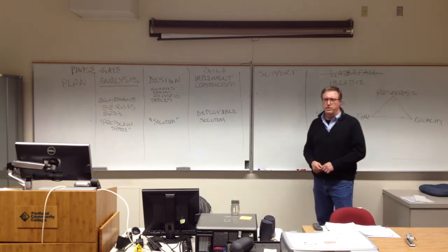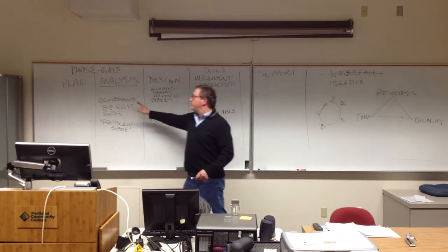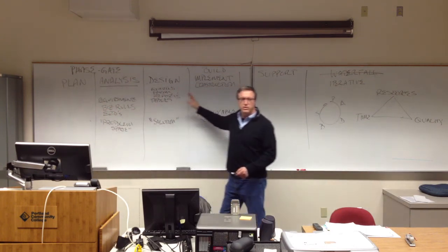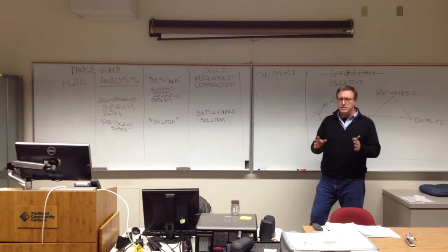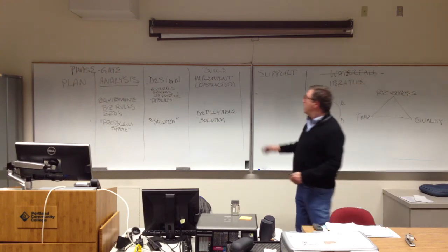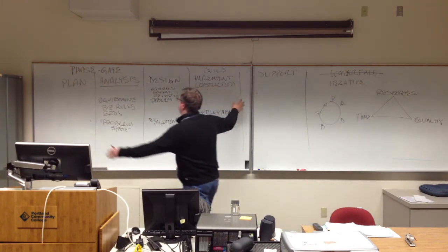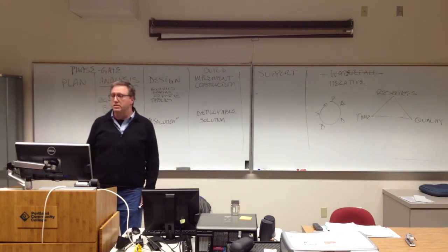I tended to work on fairly small things, so there were 7 to 20 people on it. If the projects where they expected to do this for 6 months, and then do this for 6 months, and then do this, they'll fail. So these days, people do this in what's called an agile or iterative manner. And this whole sequence, at least from here to here, is between 2 to 4 weeks.